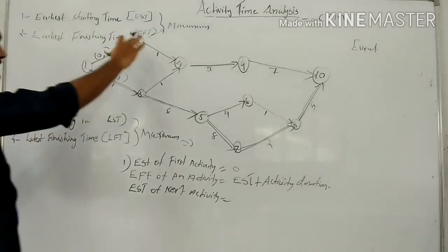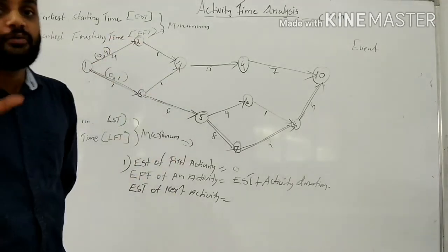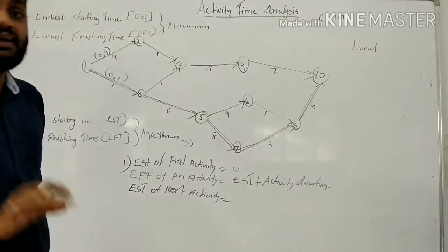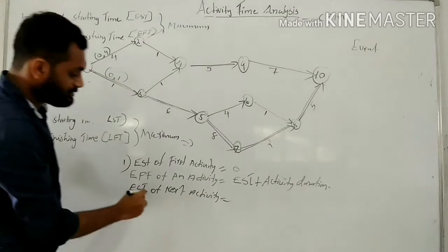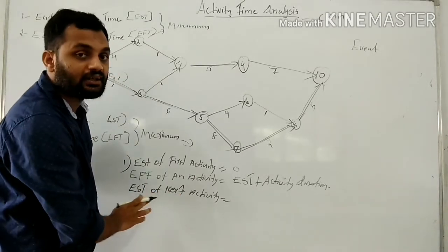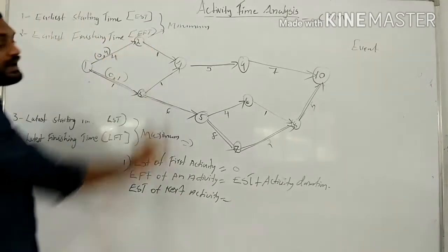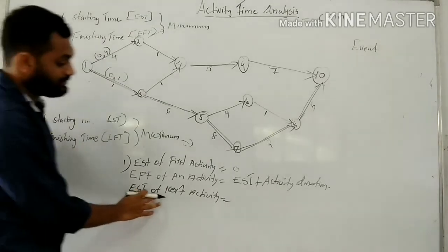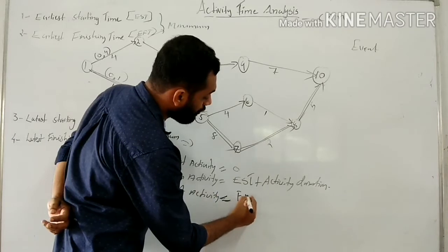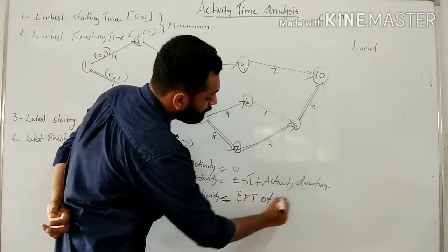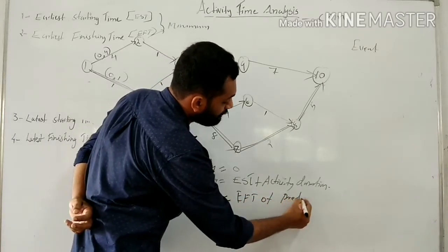The EST of an activity is the EFT of its predecessor activity.